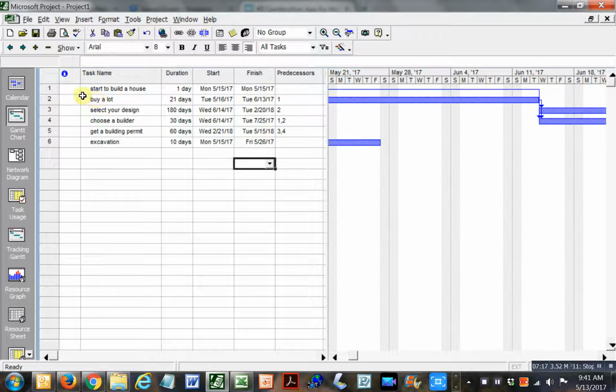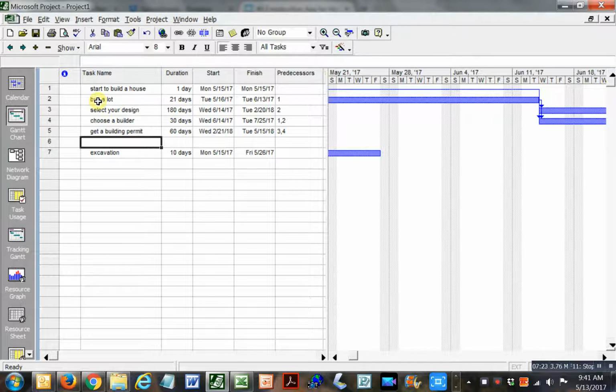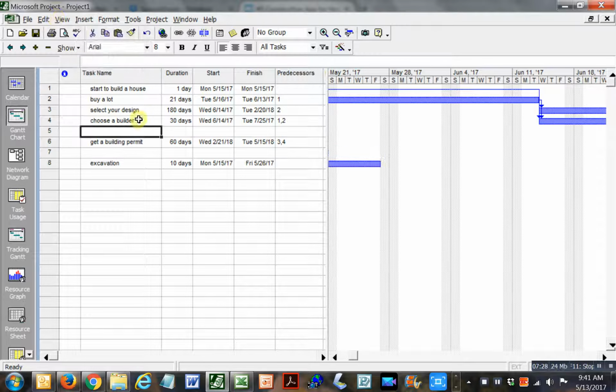All right. So I'm going to put another task in here, which, instead of get a building permit, at some point maybe should be above this. So I'll insert a task here. Secure your financing. All right, so you've got to have the money to do this project. It can be pretty expensive. So you go to your bank or a construction lender, and typically in these kinds of projects you get a construction loan, which can be quite expensive. But once it's finished and the process has been de-risked, you can go to one of the major banks and usually replace it with something quite inexpensive, especially if it's a home. So let's say secure financing. We'll put in, I don't know, 20 days.